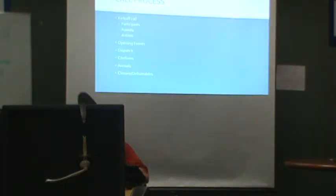Schedule conference calls with partner and end user. That is something you're going to ask: Mr. or Mrs. Customer, how often do we need to have a regular check-in call to judge progress? On a 2-location project, you don't need one. If you've got 10 locations, you probably should have one. That's just good general housekeeping. You also need to identify any customizations that have to appear on an invoice, like the site number or the POC's name on every invoice. Whatever customizations they need, we define that here.